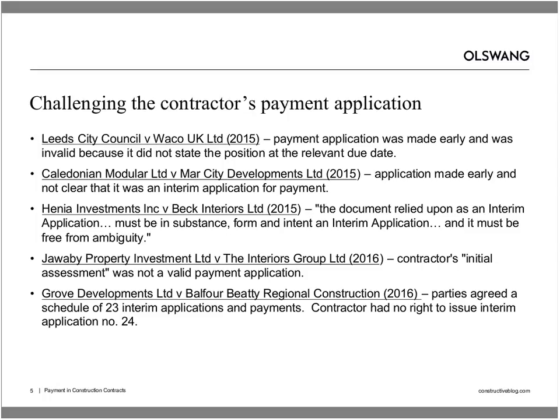And I think one of the important things that comes out of some of these cases is not just a question of the timing of the application, but the form of the contractor's payment application is also very important. So we see, for example, in the Interiors Group case earlier this year, the contractor had made its payment application, but had written on it that it was its initial assessment, and the court said that that was not a valid payment application because, again, it wasn't unambiguously clear that it was intended to be a payment application at all.